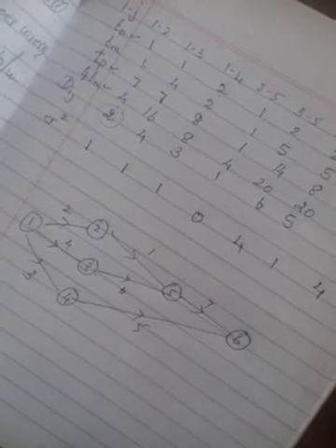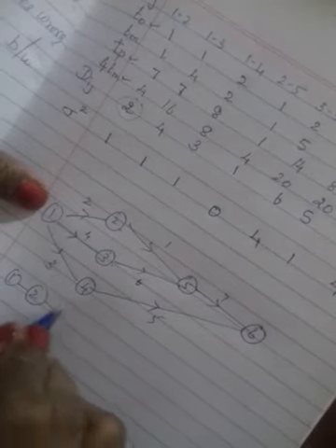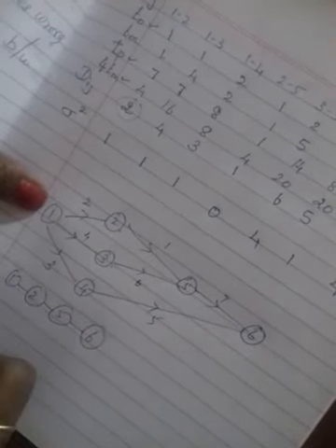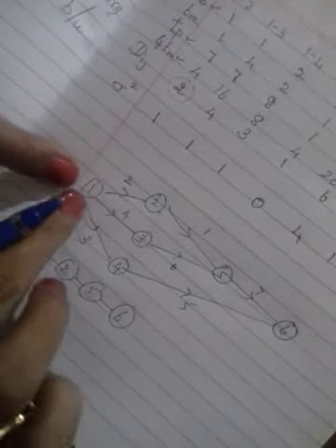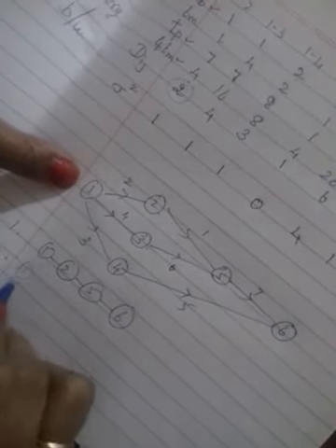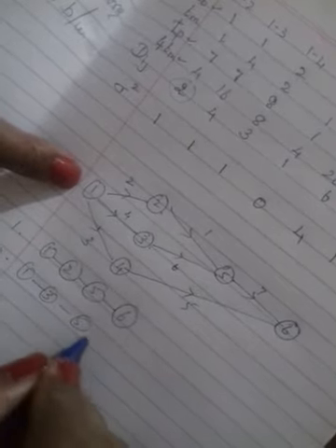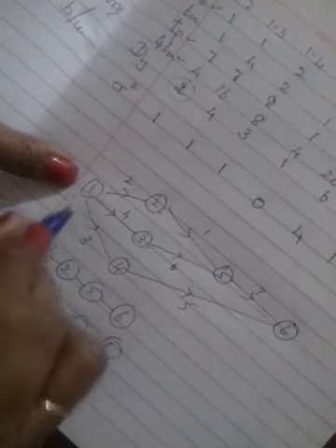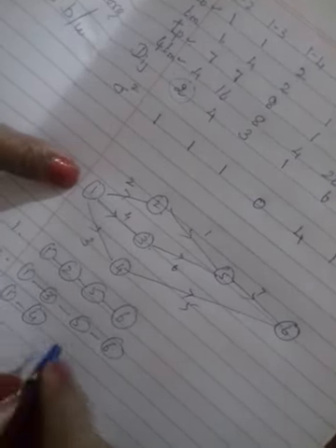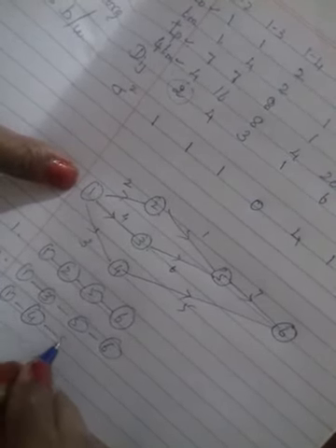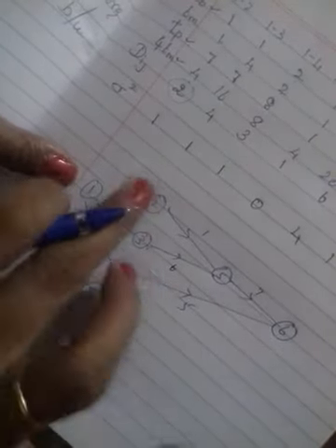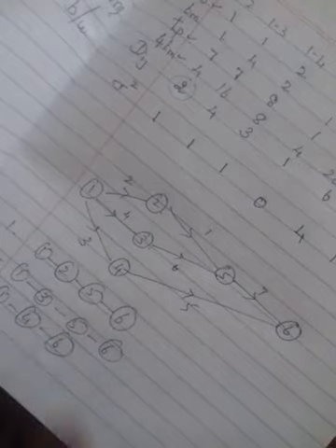Now you have to find your critical path. How to find the critical path? First find how many paths there are, starting at the start node and ending at the end node. Starting node is 1, then 2, then 5, and directly you end with 6. This is one path. The second path: 1 to 3, 3 to 5 and 5 to 6. And the third path: 1 to 4, then directly to 6. So there are 3 paths available, and there is no merging activity here.